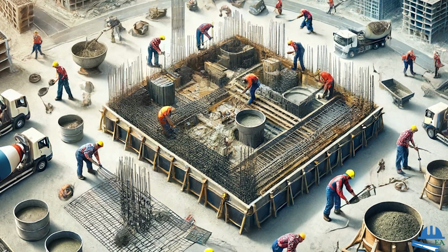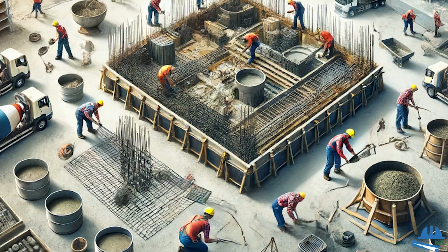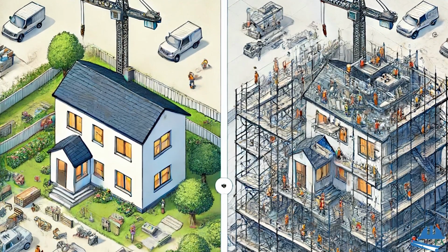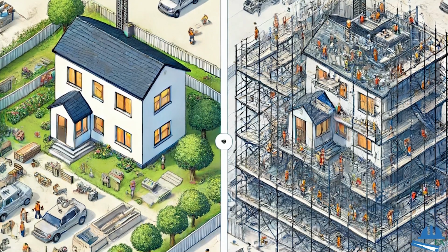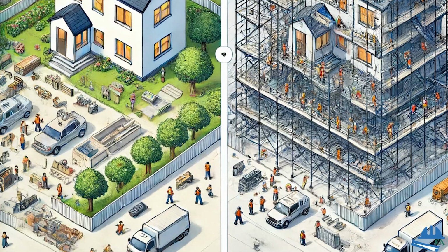So if the location is in the remote area, then the labor cost will definitely be high, and if the location is in the urban area, the labor cost will be low. And also for the complexity of the project, if it is a simple project, then the labor cost will be low, and if it's a complex project, the labor cost will be high.